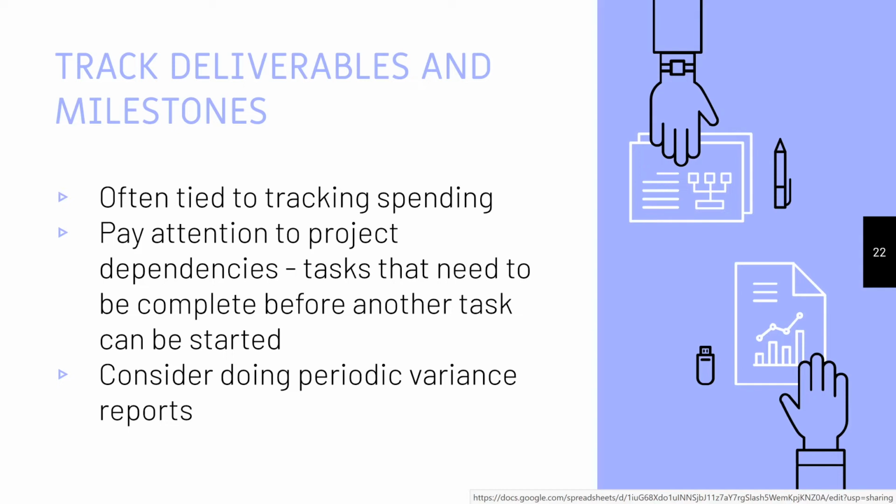With regard to tracking the deliverables in relation to the milestones you've set out, the next point is important, and that is dependencies. Presumably in your planning process, you have planned your deliverables and milestones such that things that need to be done before the next task or deliverable can be done, there's a sequence there usually. So in the case of, say, repository migrations, the metadata needs to be clean and ready to migrate before we do the migration, an obvious example.